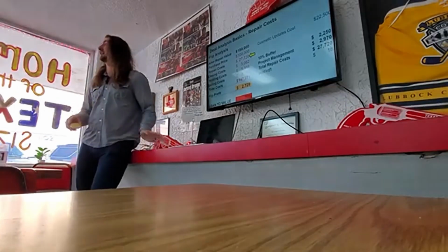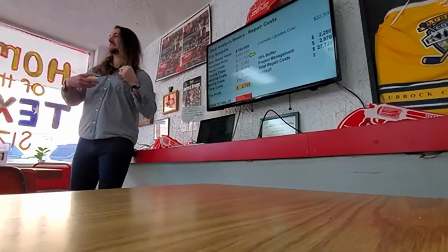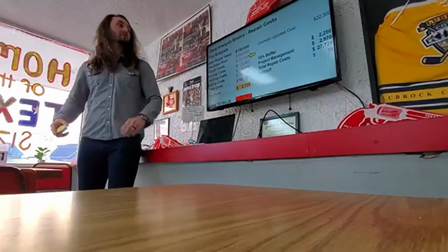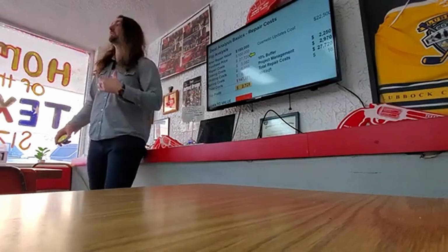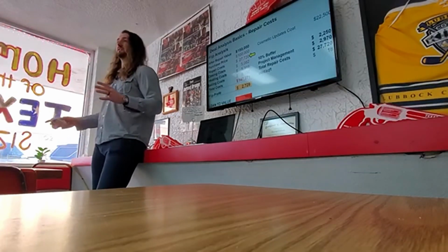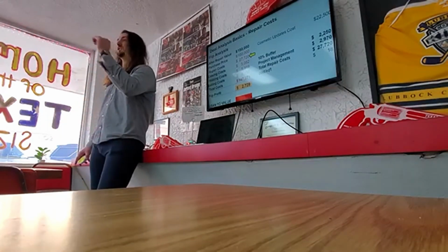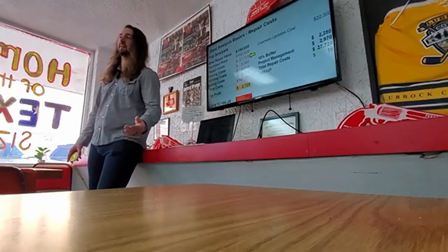Again, this is my calculator, and this kind of alludes to what we're gonna talk about later, is building in the ability to scale into your numbers. So contractor said it was 22.5, and our numbers are kind of cut off on the right, but 22,500, we put in a 10% buffer. Because even though we get inspections, you open up a wall, it's always the what ifs. You don't know what's gonna come up, or when you go to sell it, even if it was just what you thought, your buyer's gonna nitpick something that is not even real. You have to fix it for them.